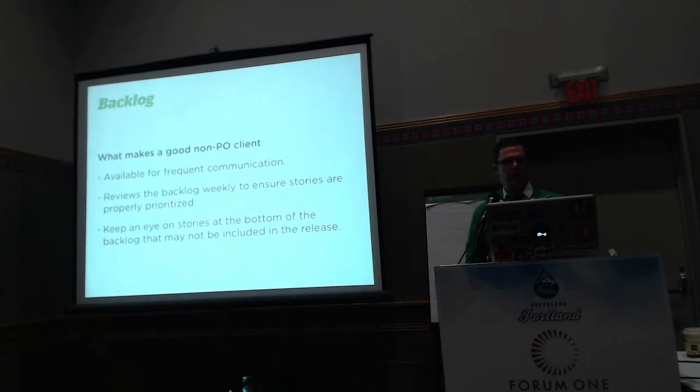And this part is often overlooked. The PO needs to be looking at the stories at the bottom of the backlog, not just the ones that have kind of bubbled up halfway or at the top, because there might be something lurking in the bottom there that is really, really key. So they do have to review the whole thing every time, otherwise stuff will be forgotten about.